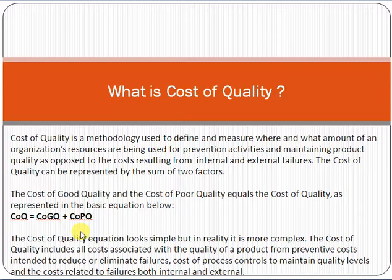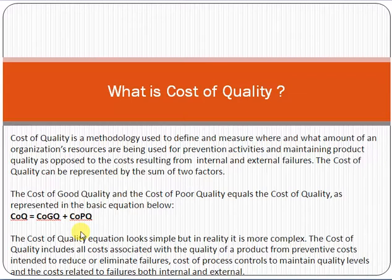If you are studying project management, I'm sure you've heard about the triple constraint — scope, time, and cost. These three factors are interdependent on each other. If there is any impact on scope, there must be an impact on cost and time. If there is any change in cost, there must be an impact on scope and time as well. So a change in any one factor causes a change in the other two.